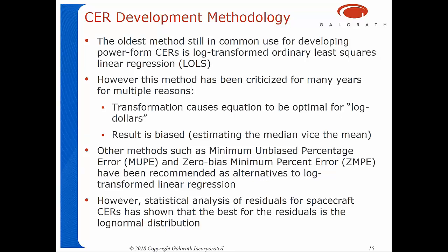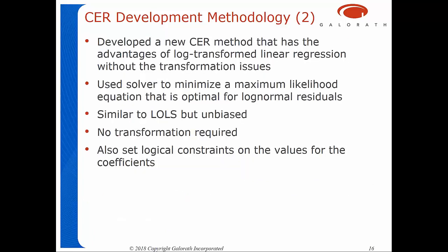There are some other methods such as MUPI and ZIMPI that we recommend as alternatives, but every time I analyze the errors or the residuals of spacecraft CERs, the log normal is the best fit. When the log normal is the best fit for the residuals, the log transform ordinary least squares has some optimal properties. To take advantage of that, I developed a new method that uses maximum likelihood estimation to make it optimal and to avoid the whole transformation issue. So it is a computer-based method. You can't do it by hand anymore, but nobody really develops CERs by hand anymore anyway. Just like MUPI and ZIMPI, you just have to use solver to optimize the equation.